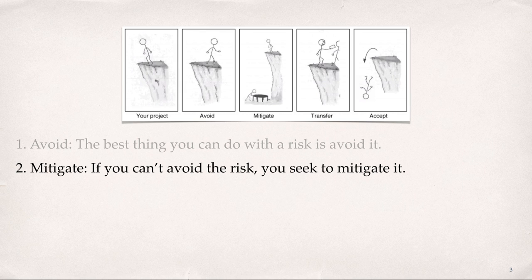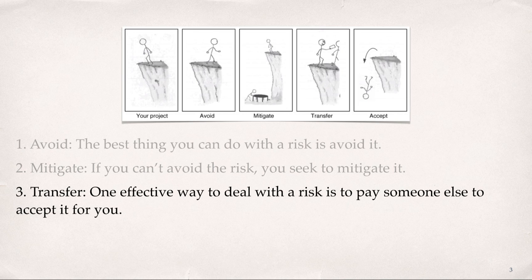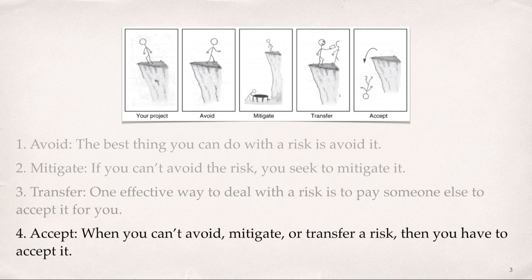The second is to mitigate. If you can't avoid the risk, you seek to mitigate it. This means taking some sort of action that will cause it to do as little damage to your project as possible. Third is to transfer the risk. An effective way to deal with a risk is to pay someone else to accept it for you, and the most common way to do this is to buy insurance. And finally, is to accept it. When you can't avoid, mitigate, or transfer a risk, then you have to accept it. But even when you accept a risk, at least you've looked at the alternatives, and you know what will happen if it occurs. If you can't avoid the risk and there's nothing you can do to reduce its impact, then sometimes accepting it may be your only choice.